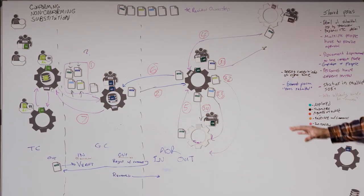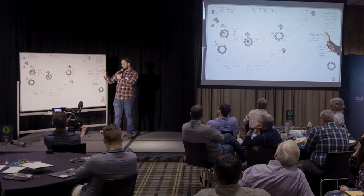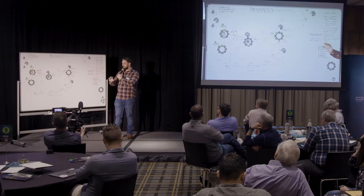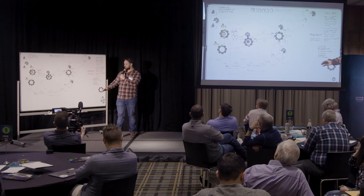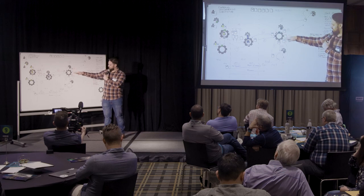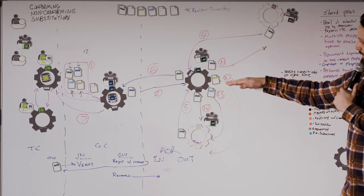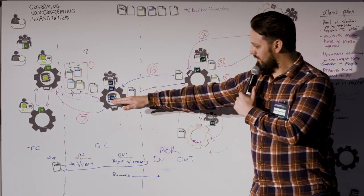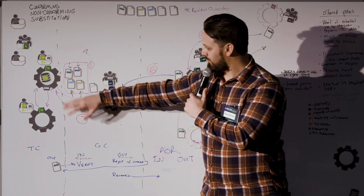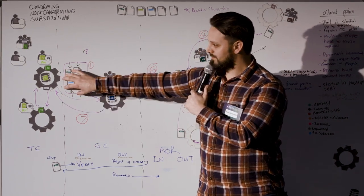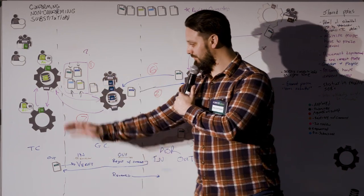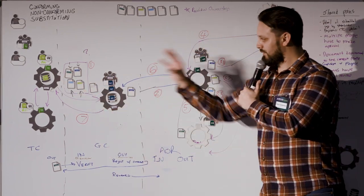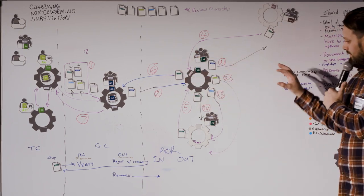A submittal package is not just one line item. A lighting package would have, let's say, ten light fixtures — eight could get approved, two could get declined or partially approved. But what matters is the light fixture that takes eight weeks to build, not the one you can get off the shelf tomorrow. Each lens is looking at things differently trying to get this through.